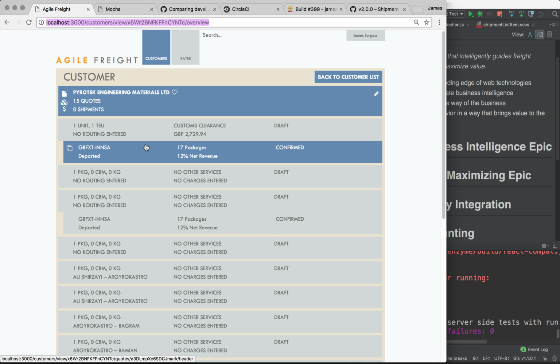So one thing there should definitely not be is some kind of report out from the retrospective to senior management. It's meant as an internal team strengthening session, and that's all based on trust. So you can't expect team members to air their grievances when they think that that's going to be exposed to the entire organization. So the Scrum Master has to reiterate, I'm not going to report this to anybody, and you guys should also not report it to anybody. We're all here to make our team better, so let's be open-minded about any feedback and really set the atmosphere for a good team building session.